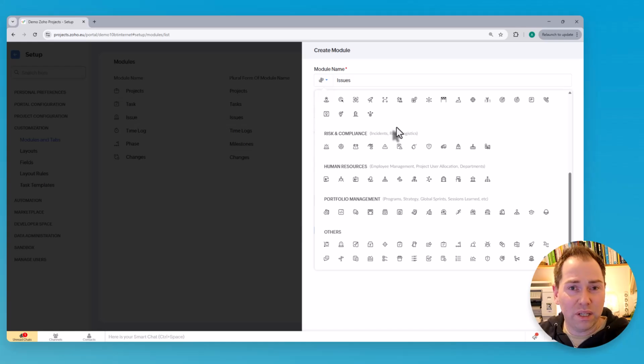It's kind of cluttered with other fields and other features that you don't need. And this allows you to just add exactly the fields you need for, let's say in this case, your change process. When I worked as a project manager in the past, we'd have a change log, but we'd also have what we called a RAID log, which was the risks, issues, dependencies, and assumptions. So that's another thing that I could see us using this for, to document that.